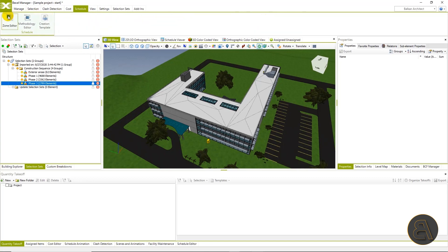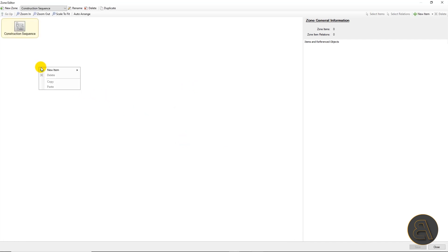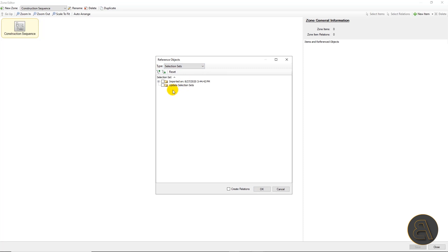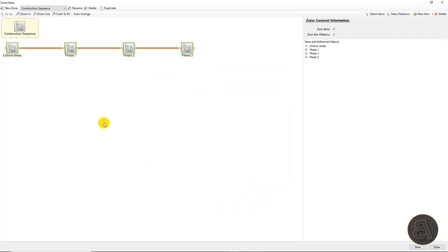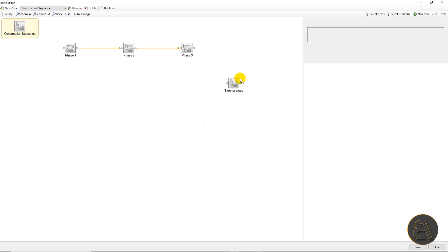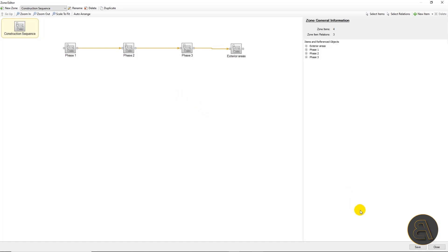We'll go to the schedule tab and click on the zones icon. Let's create zones for construction sequence first. We'll click on new zone and enter the name of the zone. Then we right-click anywhere on the screen and choose new item from the drop menu and then linked. In the type field we will select selection sets and check all four selection sets that were previously imported. We'll also check the create relations option and then click OK. The construction sequence is created with all finish-start relations between them, but we want to rearrange it so that exterior areas are last in the sequence. We'll delete a relation, move exterior areas to the last position, and connect it again with phase three.